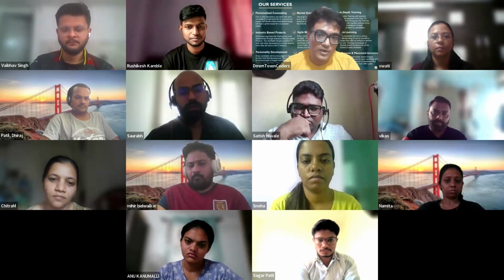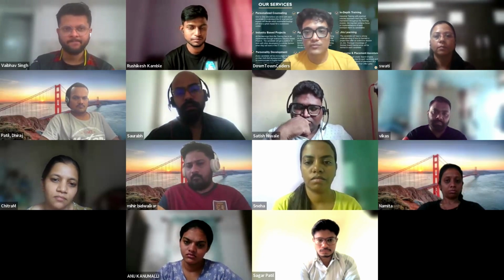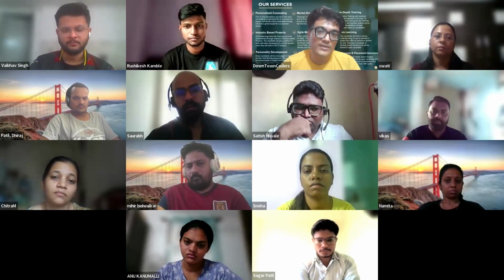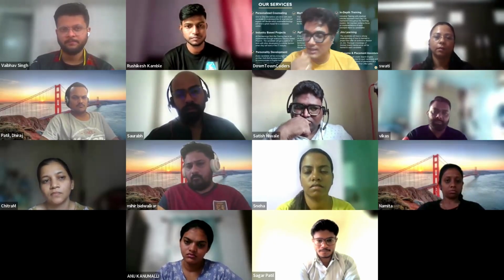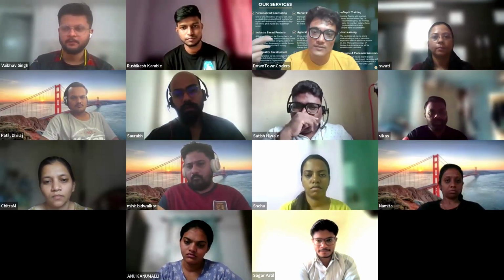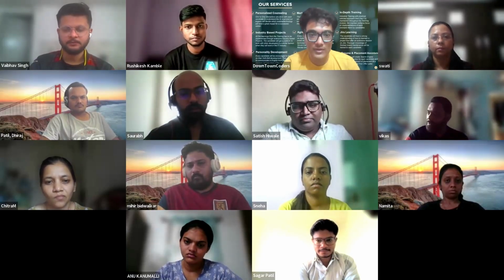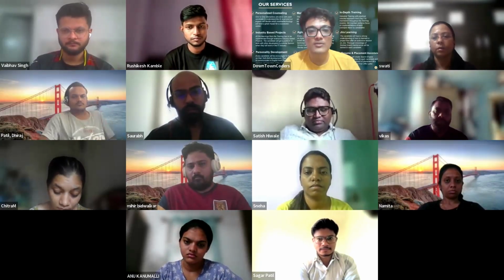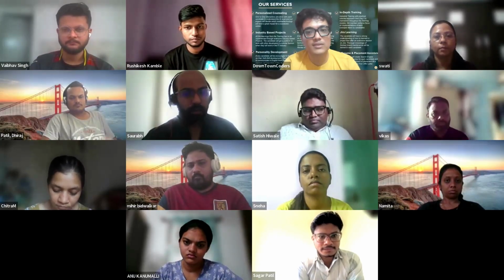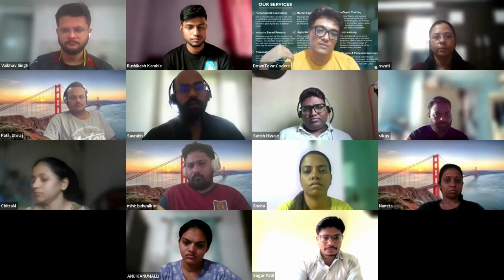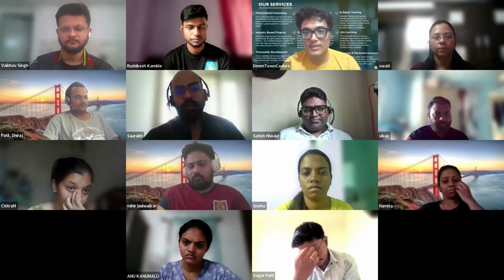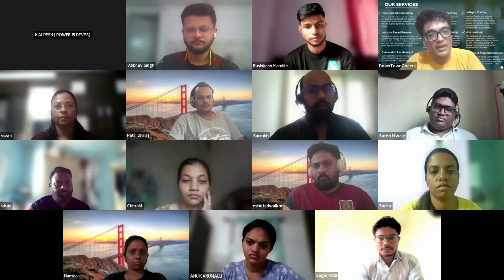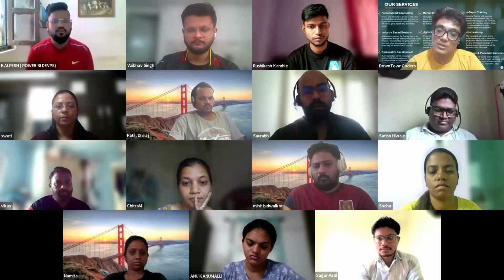UAT feedback we try to avoid. Why do we try to avoid it? Because it is not appreciated in the industry. It affects the sprint deadlines, and last-moment changes are quite deadly. It will affect the entire sprint. That's the reason we always say be transparent to the client. On a daily basis you are meeting on Scrum calls. When you're meeting on Scrum calls, explain and get the information there itself. Why wait till the last day to receive the feedback? Never assume anything and proceed with your development. It should always be based on confirmations from the client, and not verbal communication, but email communication.